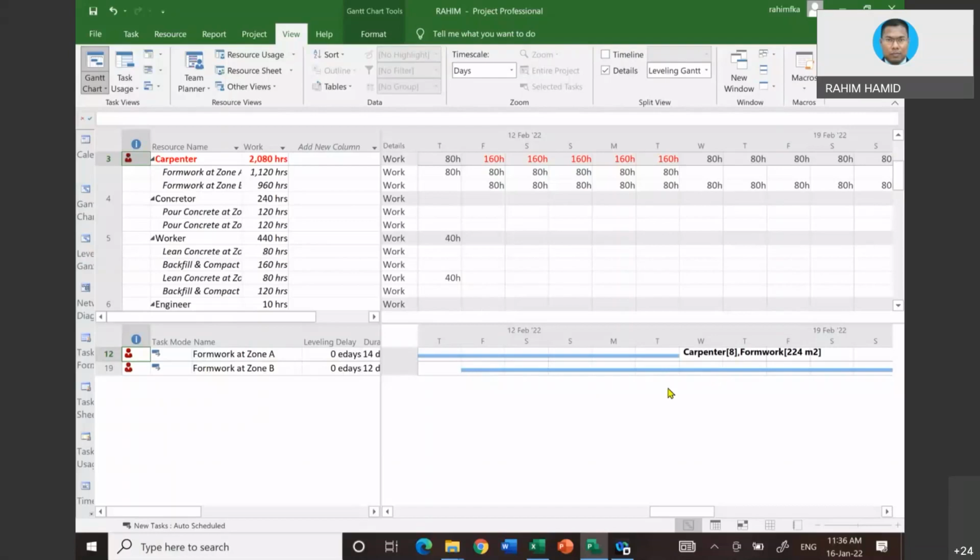If you already come into this kind of exercise, you notice there is this value here. This is for you to shift, delay by 1 day. What will happen, you see? You shift by 1 day, nothing is going to be affected because the red man is still there, meaning to say your problem is still not being solved.